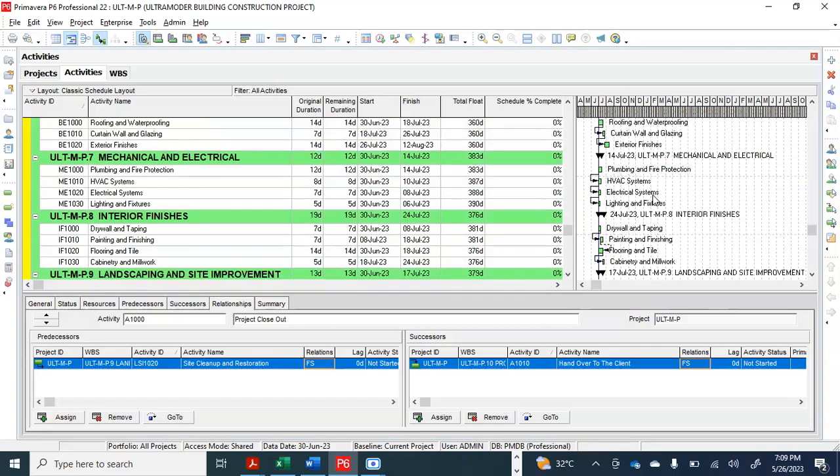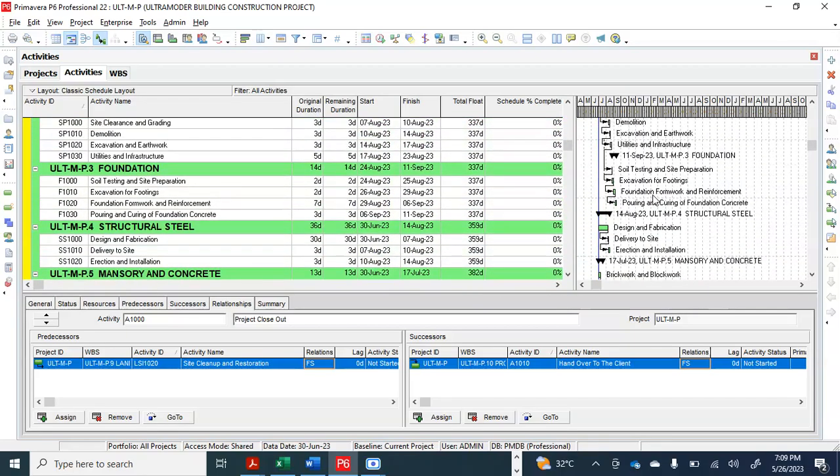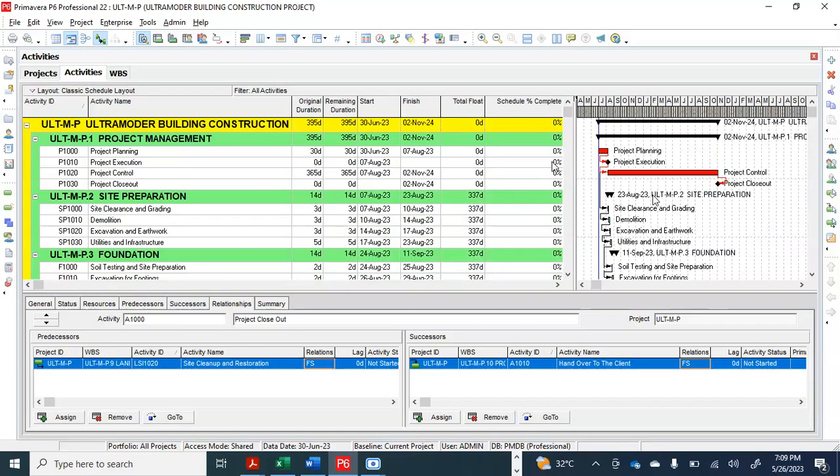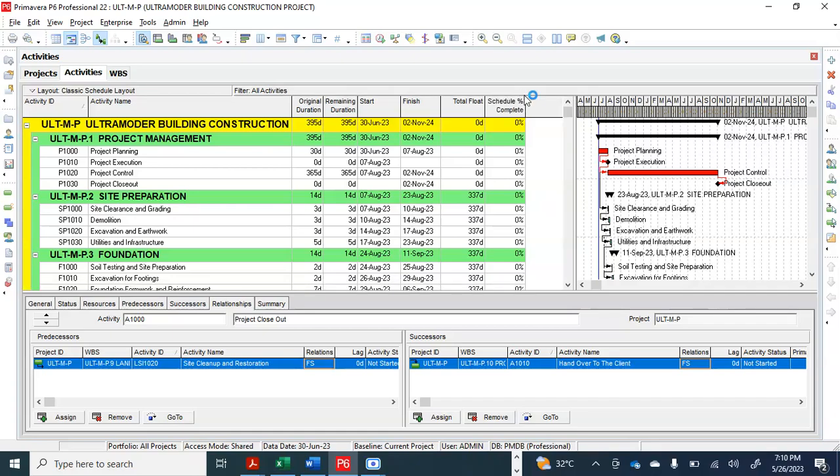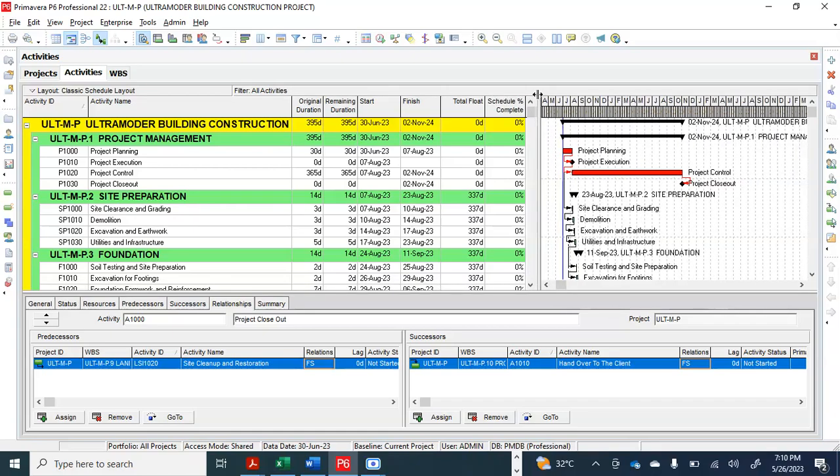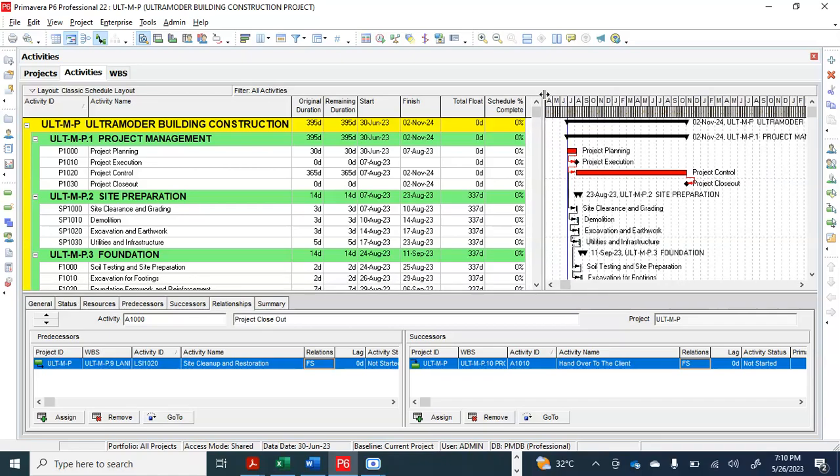So it means you need to do proper planning work, which is the beginning. Getting to know these different subcontractors, their job scope, their duration, and which one is the predecessor and the successor from each subcontractor. You need to view it in your head first before you start pouring it onto the system. Very well. 100% complete.